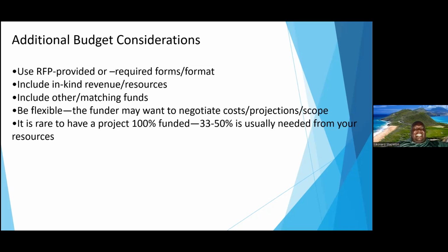Remember I spoke about the in-kind? As much of that as you can get, please get it. If you look at the last section, you'll notice that there are a lot of funders that don't give 100% of the money that your project costs. They're looking for you to get some in-kind support, right? And there are various ways in which you could get it. You could get in-kind by people volunteering to do the services. You can get discounts on some of the material items that you're going to buy. You can get duty-free, okay?